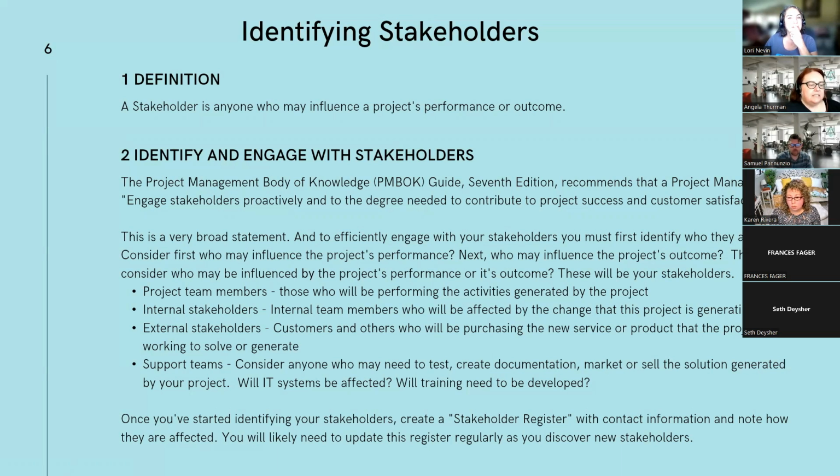So begin to consider this, and I highly recommend that you create a stakeholder register. And this register is going to be a living document, because as you go through the project, you're likely to recognize new stakeholders at different phases of the project.